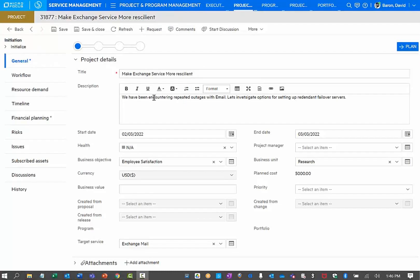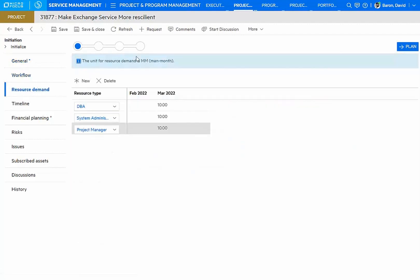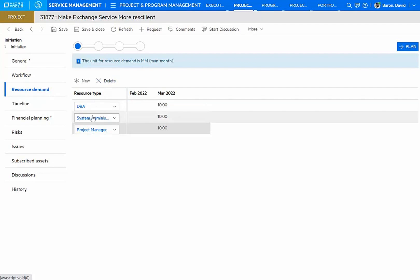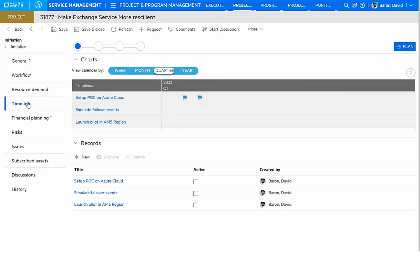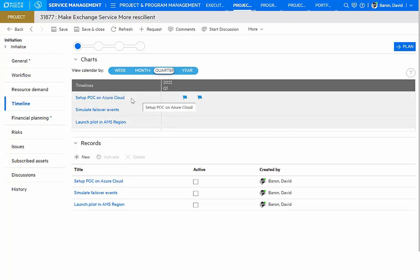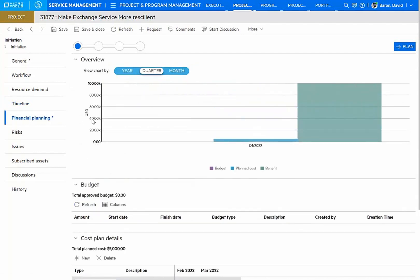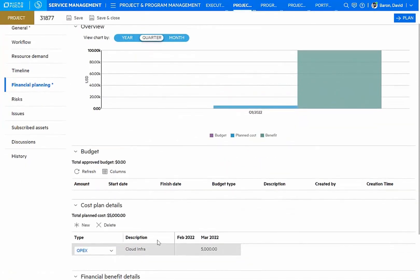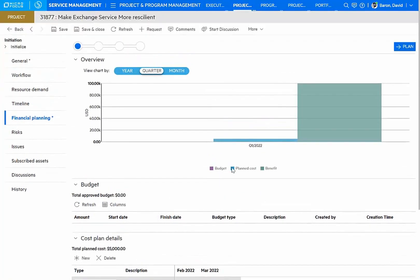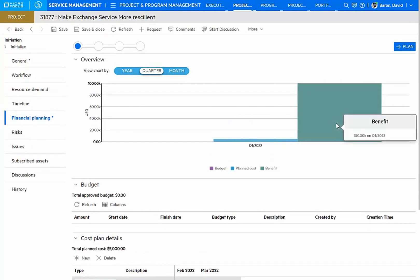As I plan my project, I have at my disposal all the tools necessary to get things organized and executed. I can capture all the resource demand I will need to do this investigation. I've put in that I will need a DBA, a system administrator, and a project manager. I also have done my planning to execute with several timeline milestones. I will set up some infrastructure on Azure, where I will implement the new server, simulate my failover events, and then launch a pilot on the Americas region. Under financial planning, I can actually track the cost that we'll take for the different subscriptions and find out how that compares to the benefit that is assumed by the business.